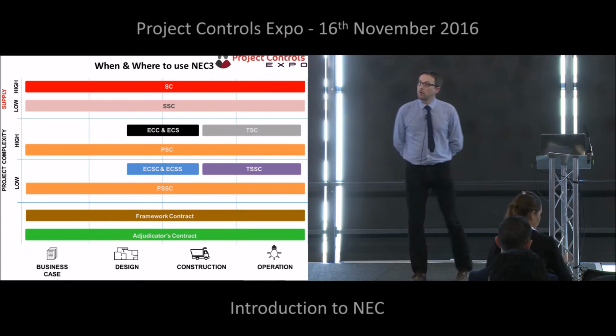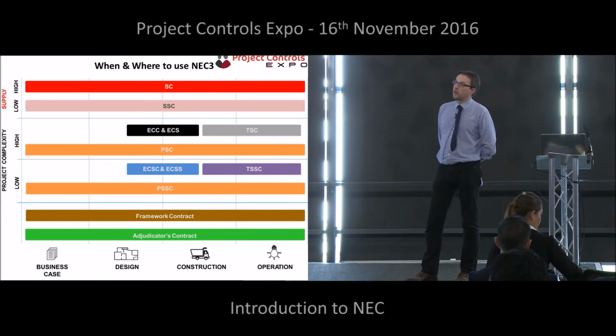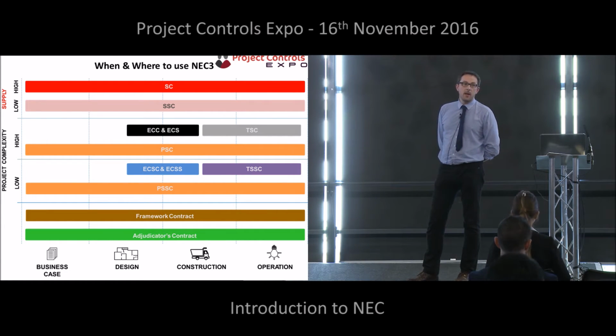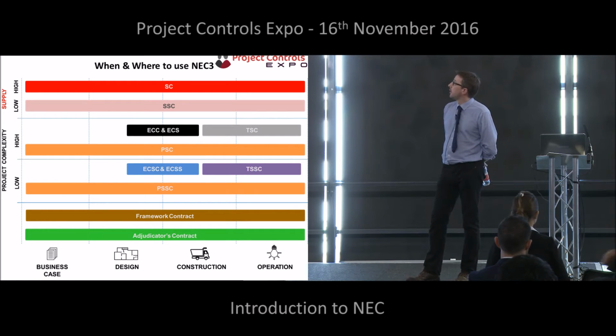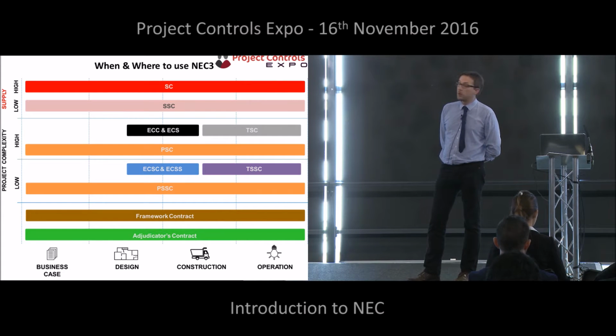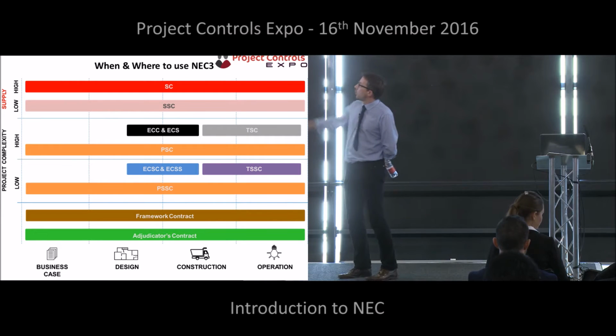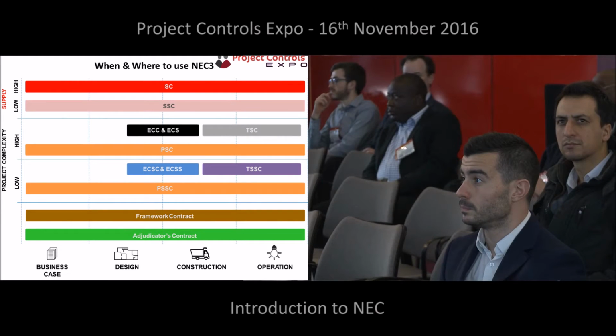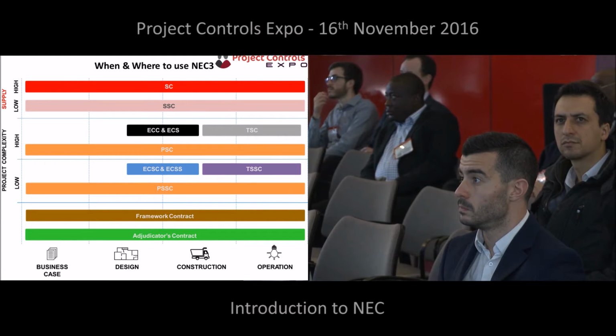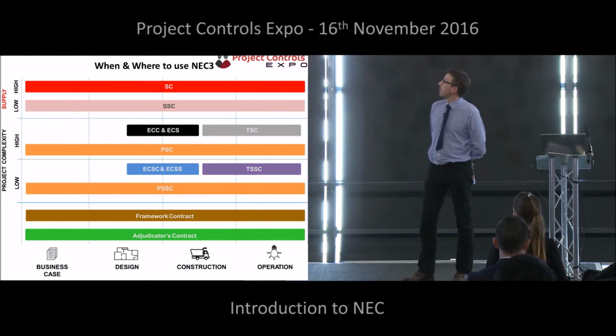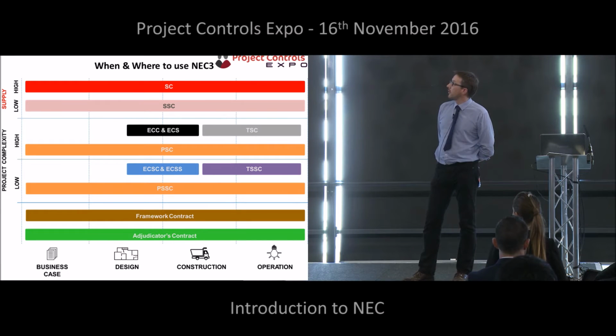The long form contract is geared for use where whatever it is you're procuring, there's a higher degree of risk, more complex works or services that you're procuring. So that's where you use long form contracts, which are indicated by the ECC, ECS, TSC, Professional Services Contract, or PSC. Okay, so there are 4 contracts there for works or services.